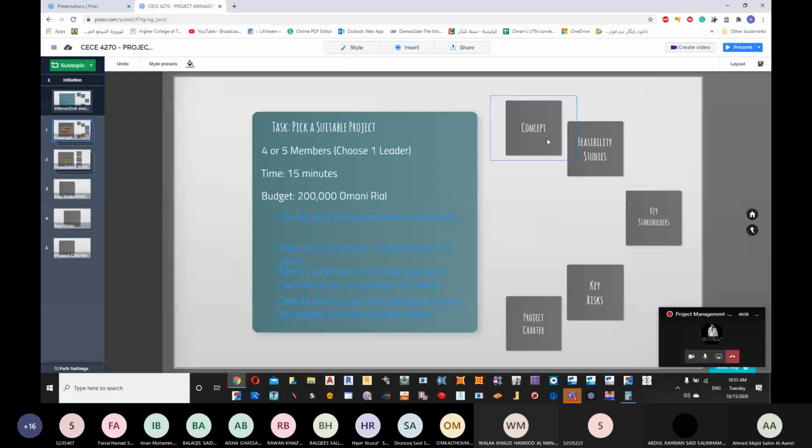So this particular document, where the owner is trying to give all the required information to the project manager, we call it a project charter. Once again, a project charter is a document given by the owner to the project manager stating all the required information, and it gives the project manager the authorization to start the project. If he agrees, he can now start the project.